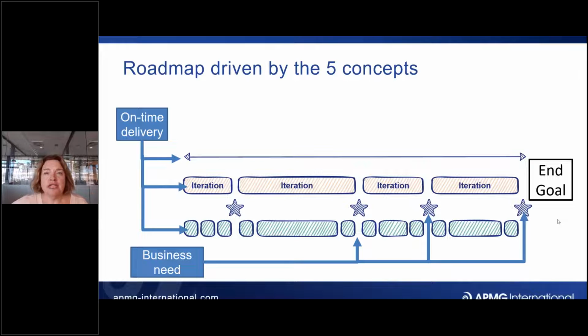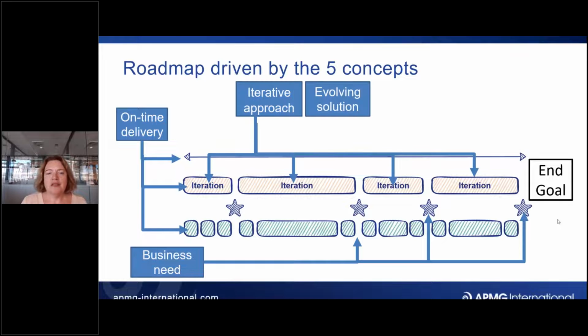So there's that logical sequence, which actually can deliver quite a lot of economies of scale. It's like a hot knife through butter. It's brilliant. But we make the business wait until we've done every single one of those activities before we deliver something. Here, we turn it on its head and say, we need to work out what the most important things for you are, and then we have to make sure those are our outcomes and they're in the right order, and then we'll work out how to deliver it. So what we've got is an iterative approach, and we build up over time.